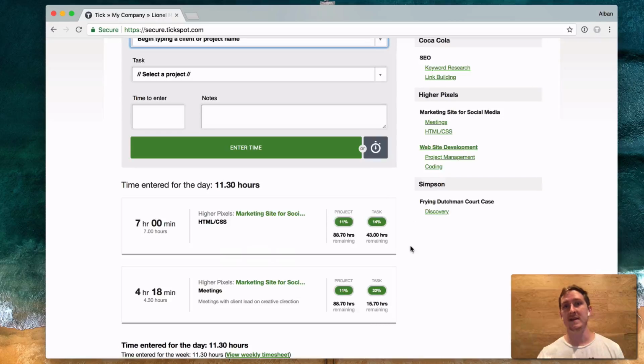Real quickly, they can see how far off they are from tracking to be on budget, and instantly reach out to a project manager or the client and say, the expectations we have for this aren't in line with how much we're charging. You could either change the budget, change how much you're charging, or pare down the scope. And if those conversations happen at the beginning of the project, you're much more likely to get buy-in from your client or an adjustment to how much you're making.